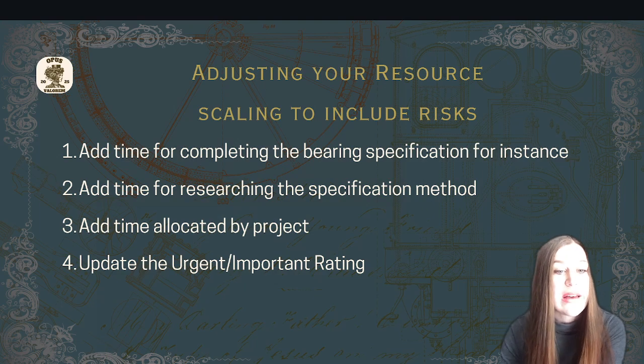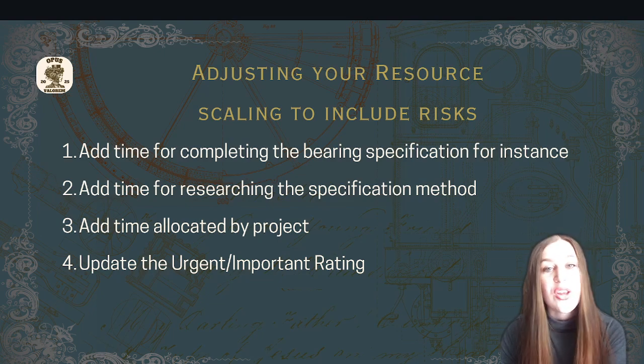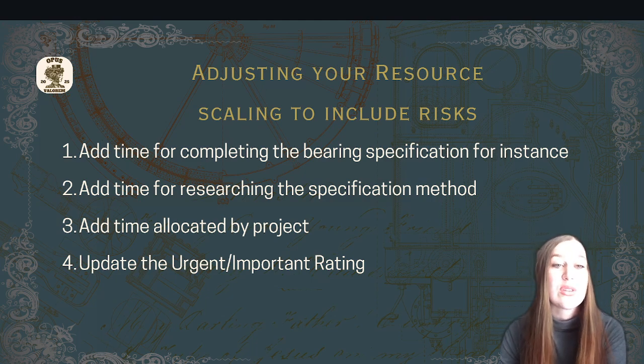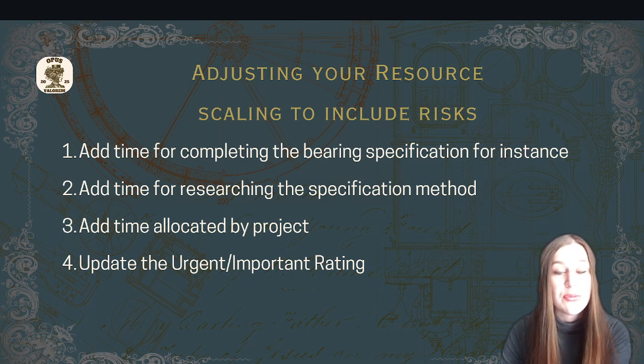Each task might have a risk associated with it. Maybe the risk is that you're not trained, or have forgotten your training on a specific analysis method. You can't remember how to specify a specific bearing with all the bells and whistles that go into the complete specification. This is a risk. The mitigation steps might be that you will watch YouTube videos on it, read your class notes if you still have them, or ask your senior about the company SOPs regarding these specifications.